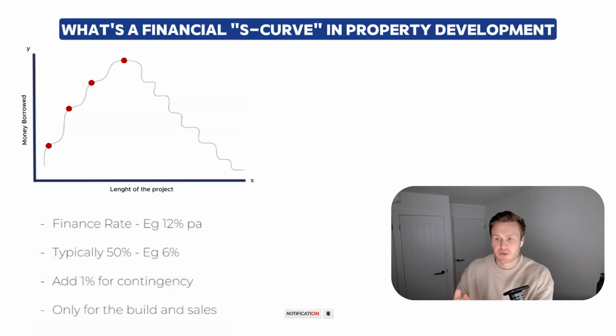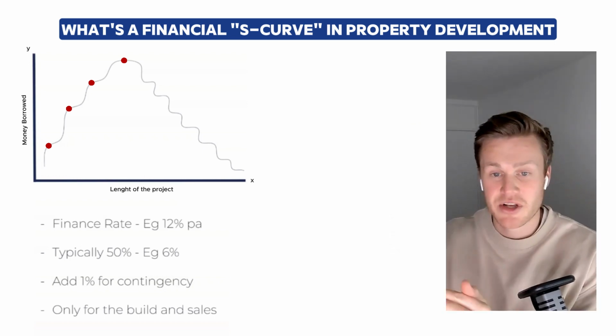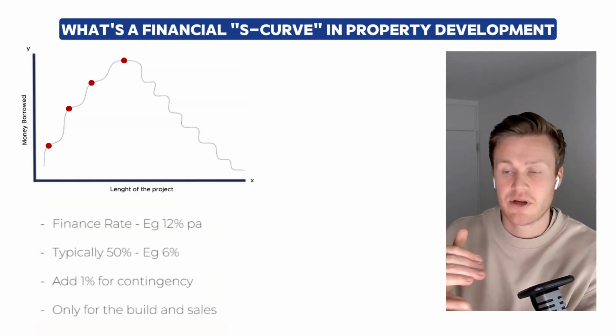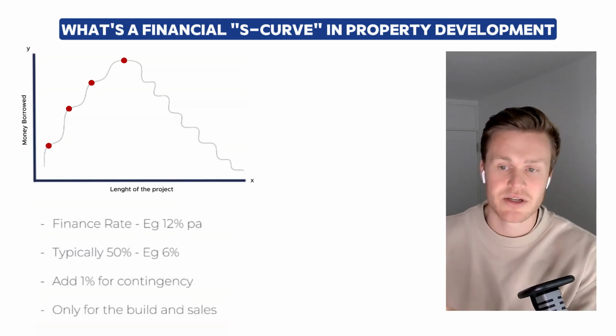In the drawdown process, where you've proven that you've done that amount of work, you've got the monitoring surveyor to site, they've produced their report, bank have signed it off, and then you draw down the funds. So in this particular example, we've borrowed 4 chunks of money. It doesn't really matter what it is, up to 100% of the build costs. And that's what we've borrowed. Where the complexity comes is we've now got to sell 10 apartments that incrementally pay that development debt and the original purchase debt down, because the loan to value has stayed consistent across the two.